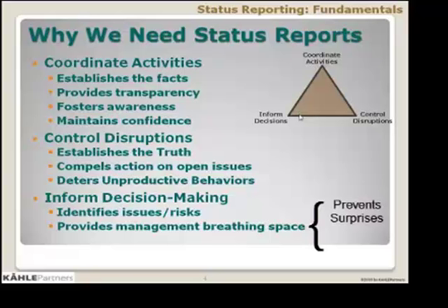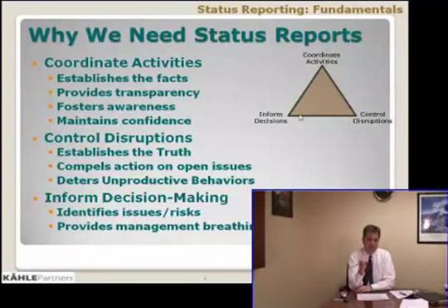But the second piece of this is that it is a very powerful tool for helping everyone on the project think clearly. In many projects, you're going to come across issues that are particularly complex and difficult to understand. And the act of taking those issues and distilling them down into simple language that can be published in a status report is a very powerful way of ordering the project manager's thoughts around a given issue. And what it also does, it provides clear information to management and stakeholders who may need to make a decision on this issue down the road. So they have a chance to mull it over.